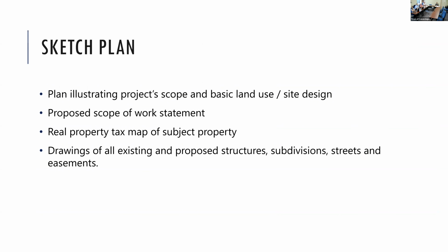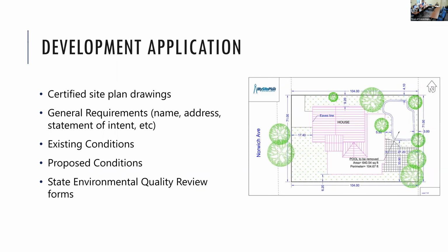So, and this is very similar to, right, the sketch plan is illustrative and generally explaining an overview of the project, what's envisioned, providing a high level scope and showing a quick graphic of what the intention is for the site or building development. And then when you get to the full application, we'll go to the next slide, the development plan side of it. This is when you really get into the full set of drawings, both existing and proposed conditions, and any permitting or other reviews that are required as part of the project.